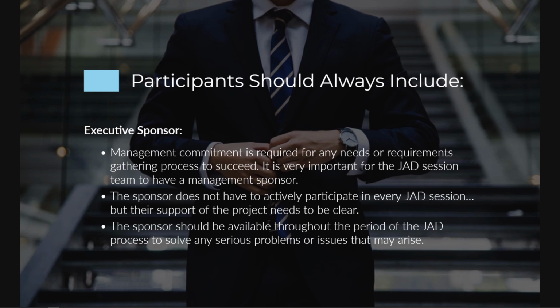The executive sponsor can be a manager of the business area whose needs and requirements are being addressed during the JAD session. The sponsor does not have to actively participate in every JAD session, but their support of the project needs to be clear. So it might be advisable to have them attend the first JAD session to show support, and then the final JAD session to review the results and make comments. So if you're having one long session, right, maybe a 3-day or a 4-day session, then you would want them there on the first day and on the last day.